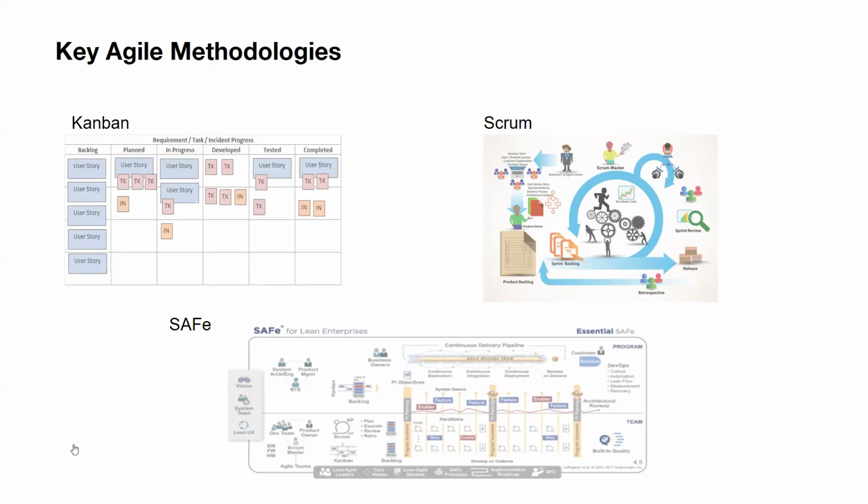Even if the client says, okay, there is this change to be done, we have to consult with our development team, right? And figure out whether we can accommodate this change during the sprint or not. If we can't accommodate it during this sprint, we will say no, it's not possible to do this, and the client has to understand it. That's why I previously mentioned the client has to be onboarded and has to be flexible with this Agile method as well.